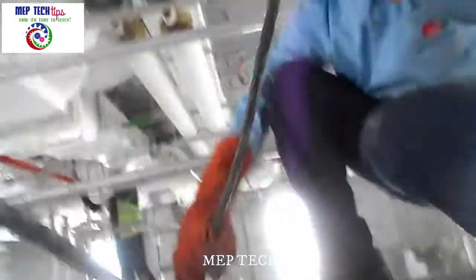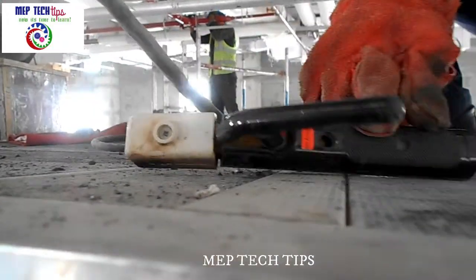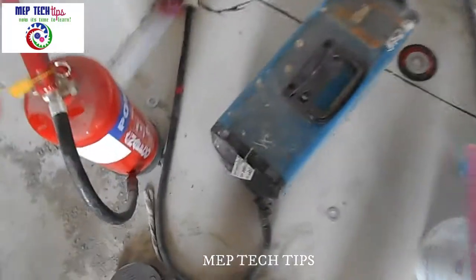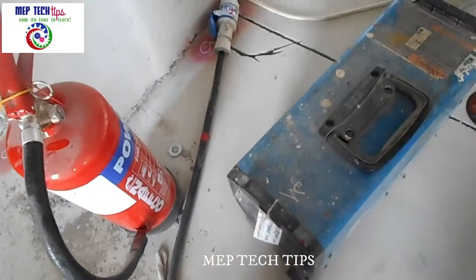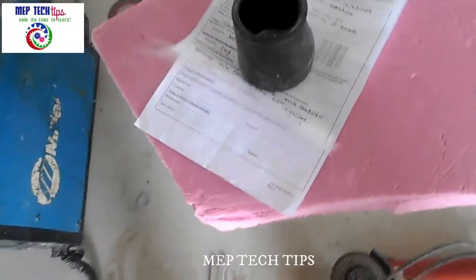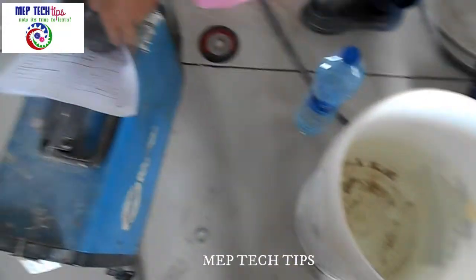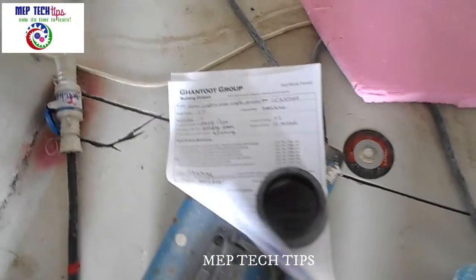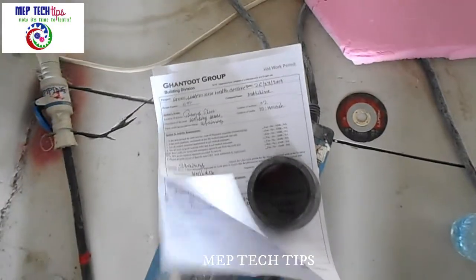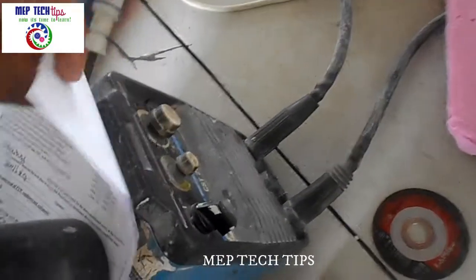You can see the welding holder. For welding purposes you need to have safety equipment — here we have a fire extinguisher, and along with this we have safety water kept here. We also have the document from the safety department: we have taken the hot work permit to work in this area. You must keep this.